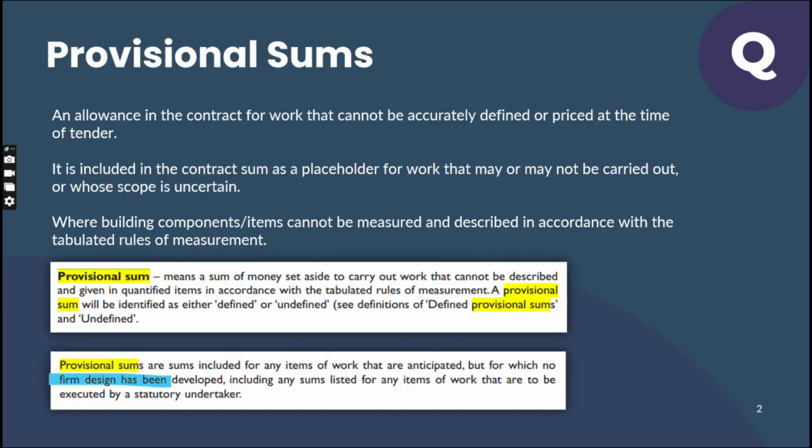Then your top management would say, don't worry, you price it, but you consider a reasonable risk allowance. The contracts manager would then say to the estimation team, dear team, please consider the highest specification and highest details. Let us not go for a medium specification or medium quality. Let us consider everything at a high level, high-risk item, high quality, high specification. So eventually, you're going to get a very escalated price. As a client, you are bearing that.